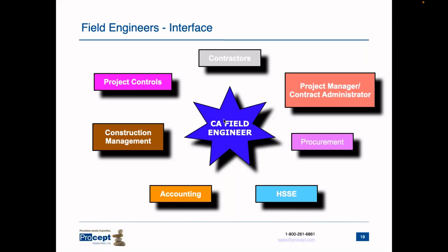Part of the field engineer's responsibility is interfacing with noted project groups — working with them to get what you need for your contractor, providing information to management, and using their expertise so you are not working in a vacuum. Field engineers have to coordinate with each other to get the project completed; the position is a team effort that spans across different groups within the organization. On site, you may want to have several related discipline field engineers situated in a room together. The field engineer is the project representative to the assigned contractor, and all official contacts with the contractor should go through the field engineer — this single point of contact avoids confusion and places responsibility with the field engineer.